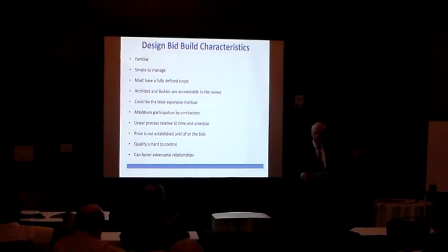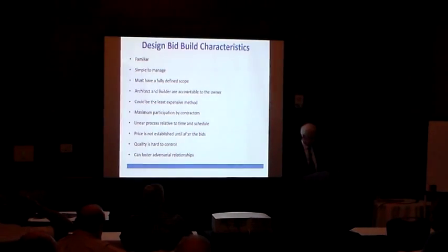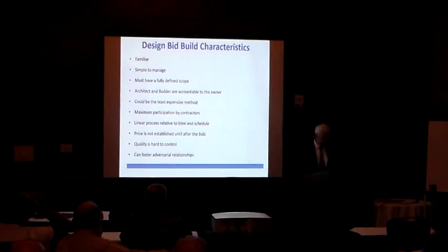That can be a good thing or it can be a bad thing. It can lead to an adversarial relationship, which can be a problem. It can be, not necessarily, the least expensive way to build. If you have a bad set of plans, a contractor can smell a bad set of plans a mile away, and if they want to, they can say, change over there. And then it's not the cheapest way to build. It might appear to be at first, but by the time the job's over, it's not the least expensive way to build. But just as much it can be.